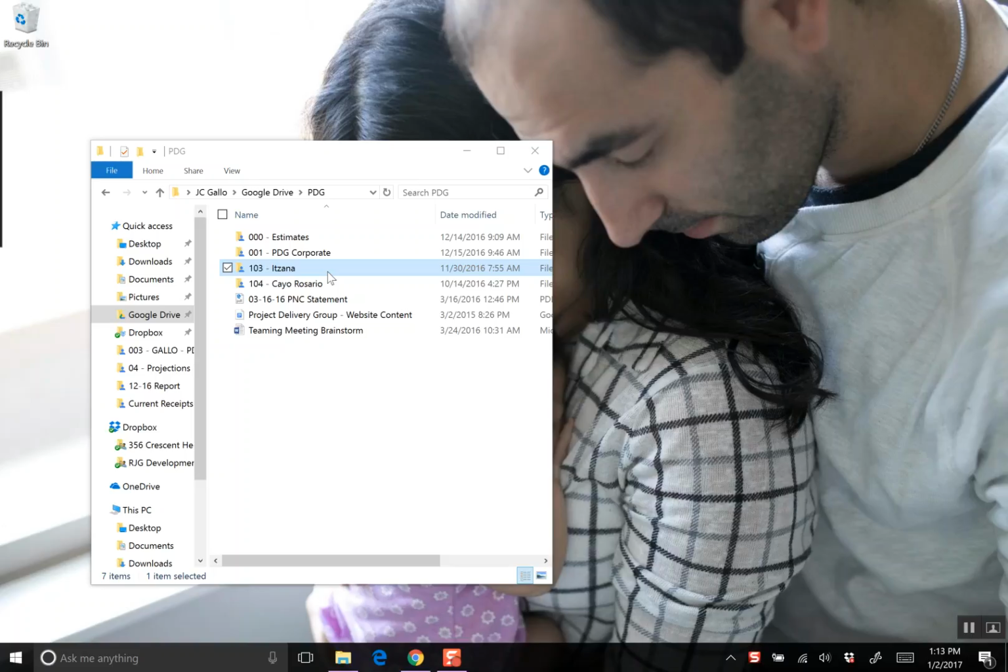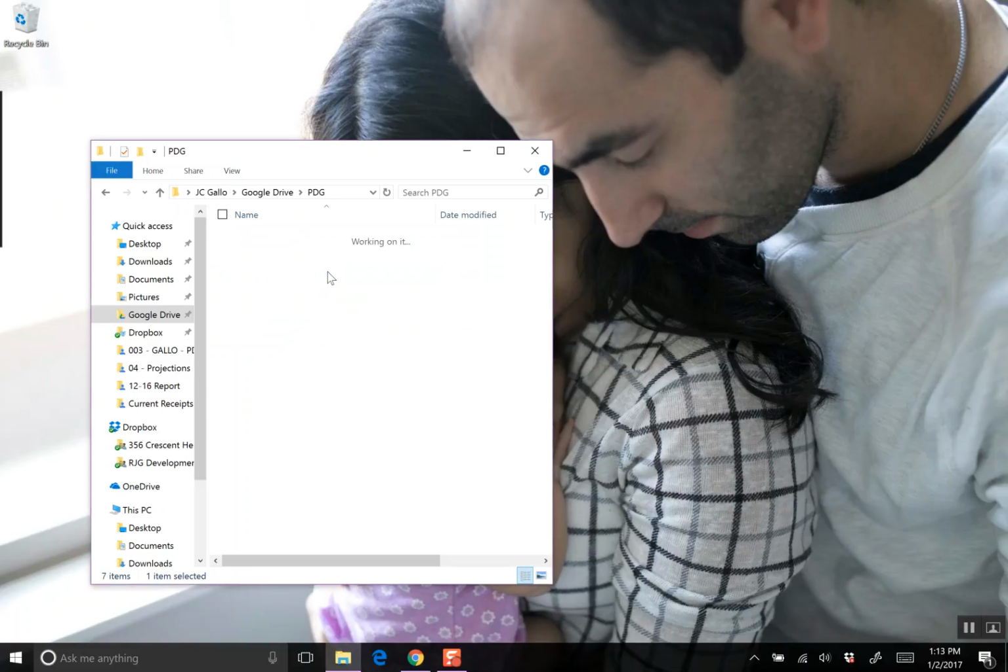This particular change order is for Gilberto Castillo Construction because in his previous change order, we had the metal roof material included with him, but we also purchased that separately. So we actually need to deduct the value of the metal roof from his last change order. So we're going to make him a new change order.